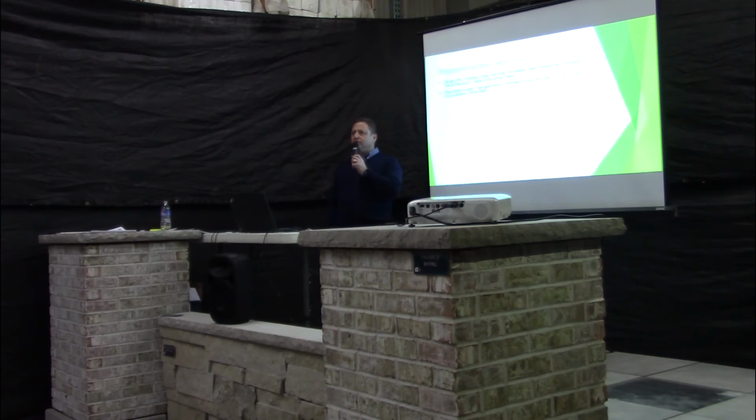And with that attitude and approach, the homeowner trusts you for doing that, and inevitably you're going to find something that you planned on doing that isn't going to go exactly as you initially thought it was. And this is the time to share that with the homeowner. You want to share that with the homeowner right now. I found a problem. I got to let you know about it, but I got a solution. If you don't do that, you're going to be dealing with this thing called the conflict monster a little bit later, because you're going to be avoiding the conflict. The key with the pre-construction meeting is to identify problems and solve them. And you want to handle the conflict right now. You want to present solutions to them. They're like, wow, that wasn't that big a deal. We figured it out right away.